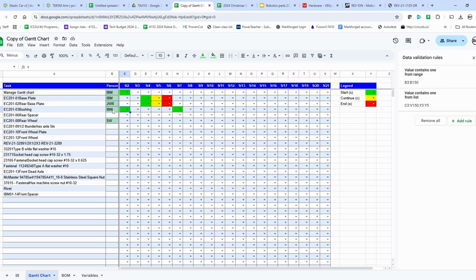So I check with that person and they tell me, oh, I'm still working on it. Then they would select continue. And the day that they are done, they will tell me I'm done, end it, the letter E. So start, continue, end. So you will work on this each day, and it's a matter of figuring out, everybody each day needs to have a job to work on.